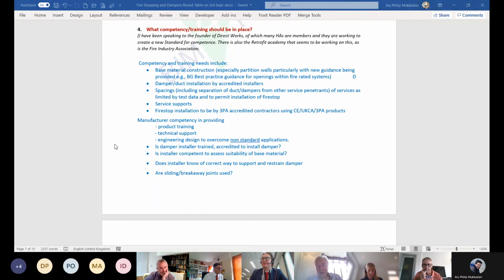I can contribute to that, Paul, just to reinforce it. On most projects we're involved with, we have between 25 and 40 BIM models. Not 3, because each work package typically has its own model. And what we need to do is to federate those different models.